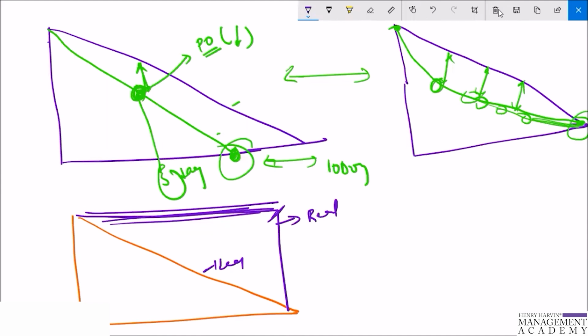The team is not able to predict the end of the sprint and even to provide the status of the current sprint. So the Scrum Master should improve it, and coach the team on why it is necessary to track the progress and how to track it. Even when you start with the transformation, you will see that this is a very common graph which you will see at the very early stage of the sprint. If a team is not adhering to the Scrum processes and is not burning the story points, such a team should be stopped after 2 or 3 days. That shows a flat line of progress, and you should immediately apply corrective action.